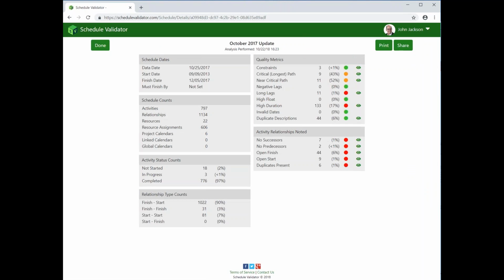So you can see here in this report, I can see issues with this particular schedule. For example, the idea of the critical path method is you have one activity that starts the sequence. You have one activity at the very end that everything ties into. And in between those two, you'll have one node that starts everything off, and that branches off, and then you'll have these tied to other nodes.